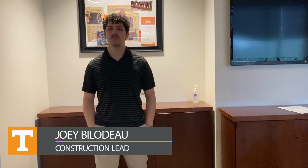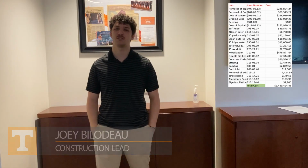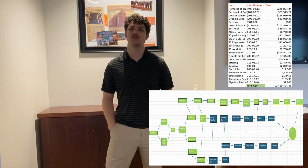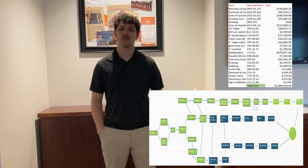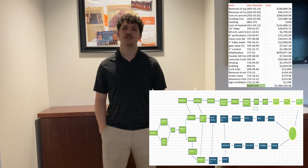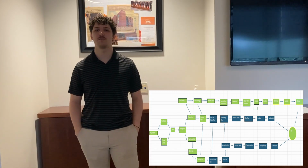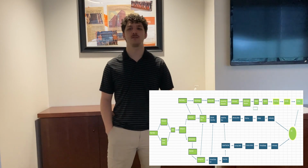Hi, my name is Bilodeau, and I was responsible for the project's construction and engineering services. My work consisted of a detailed cost analysis based on a project schedule and a life cycle analysis. One challenge I faced was keeping the budget low for the City of Oak Ridge, ensuring it was affordable. I was able to choose the necessary materials to keep the project right under $1.5 million. The schedule ensures the project will be finished within 100 days, roughly 3.5 months.